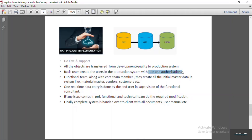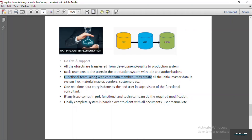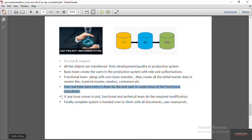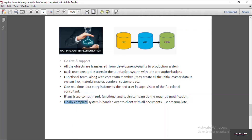A lot of data needs to be created in the PRD system as an initial data load. For example, a company may have thousands of material codes, customer ledgers, customer open ledgers, vendor open ledgers, sales orders, purchase orders, etc. — all of which must be uploaded first into the production system. Before doing that, they decide a cut-off date, meaning for around one week they will not do any transactions in the old system. They move all the data to the PRD system, and one real-time testing is done by the end users under supervision of the functional consultants. If any issues arise, the functional and technical team make the required modifications. Finally, the complete system is handed over to the client along with all documents and user manuals.